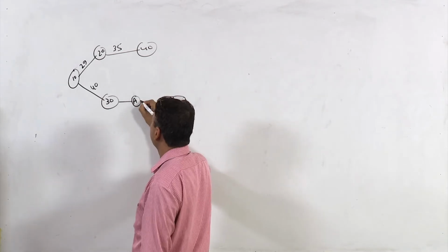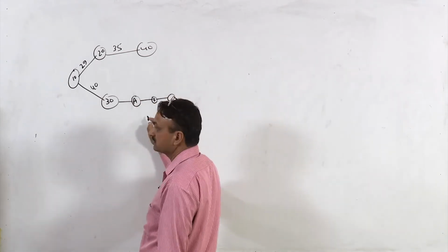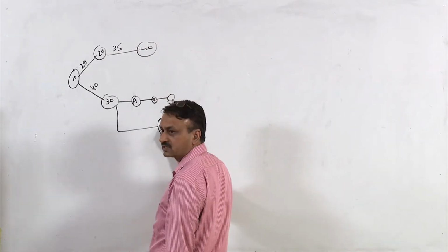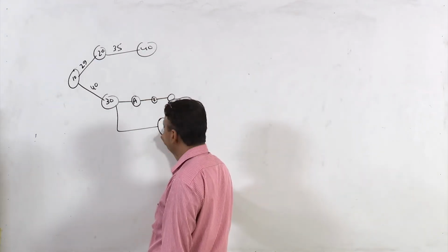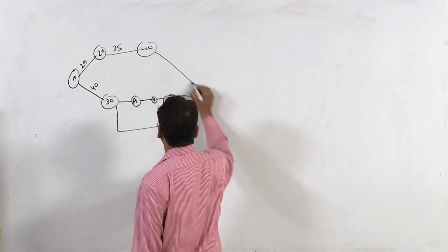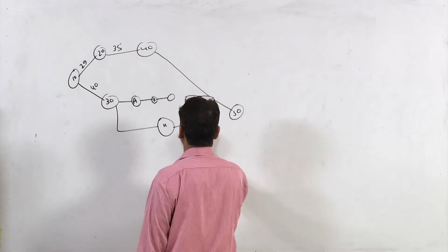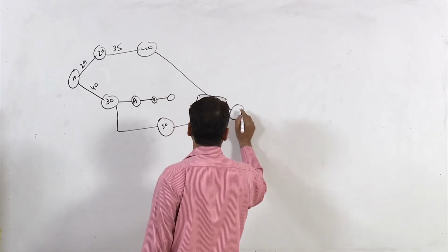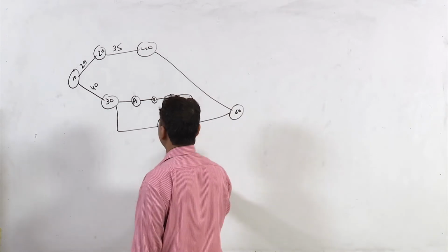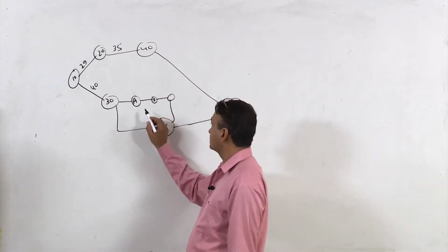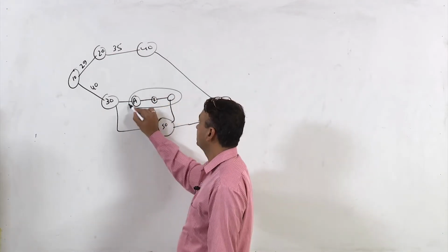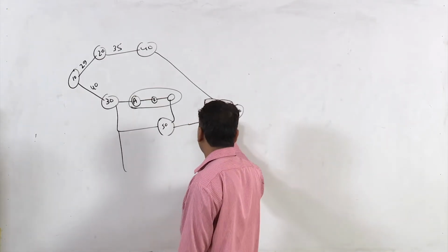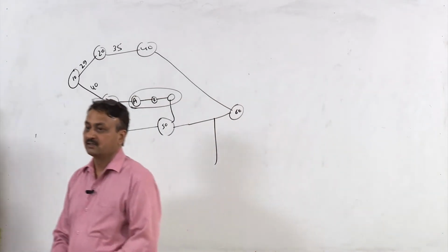So this is A, B and C, and this is the Hammock activity, this is H. So what I have done here is I have just combined all these 3 activities and taken one activity, and I will call this a Hammock activity.